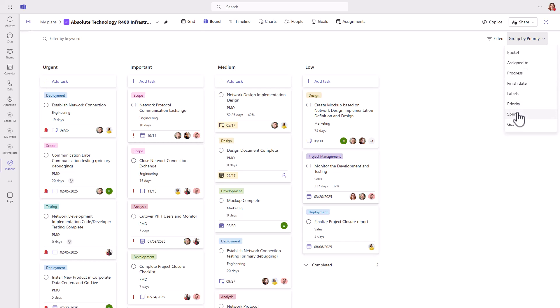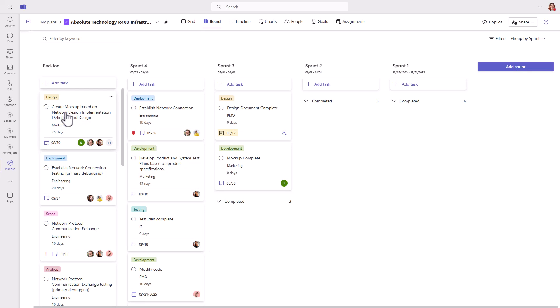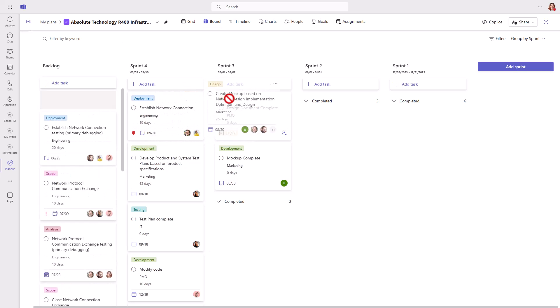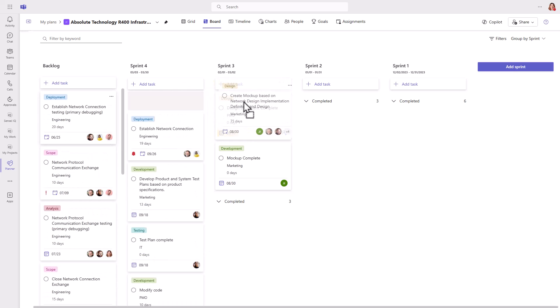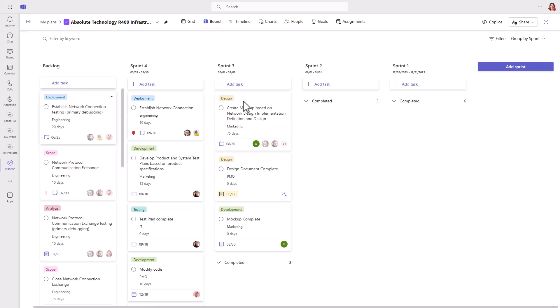If your development team wants to manage their work in sprints, they can easily filter the sprint board for their tasks, and it doesn't change the end date or the dependencies of the tasks when you move items from the backlog into specific sprints.